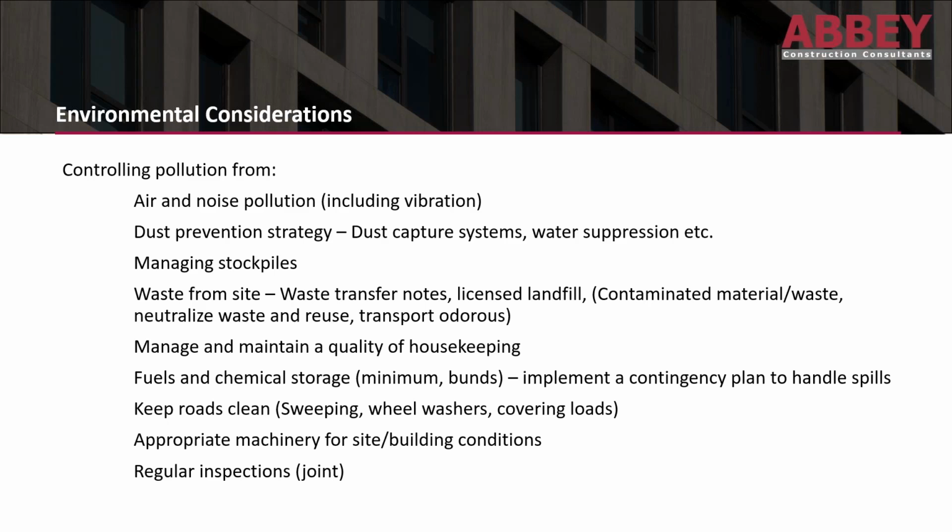Any fuels and chemicals, what's on site? Are they in bunds with a minimum of 10% of the largest amount of chemicals stored? Have they got a contingency plan to handle any spills? Or have they got spill kits, trained people, disposal arrangements for that spill kit? Are they maintaining roads in an acceptable manner? So are they sweeping those roads? Are they using wheel washers? Are they covering loads before they leave site on vehicles? Are they using appropriate machinery for the site and for the building conditions? And who's carrying out regular inspections to make sure all of the above is being addressed?